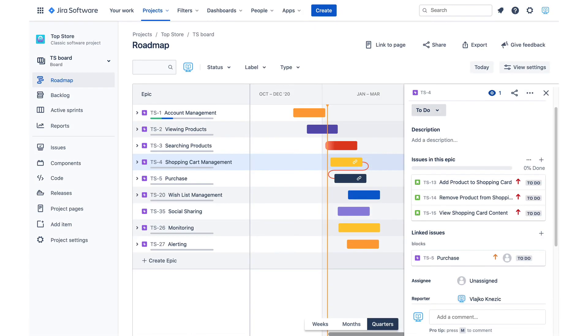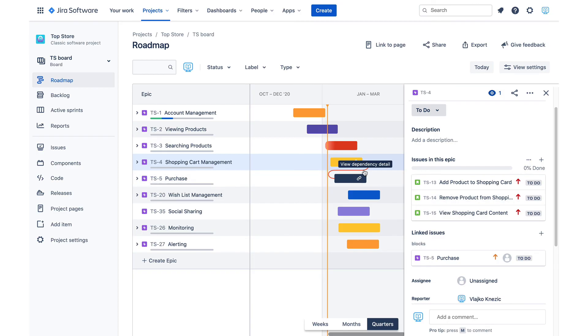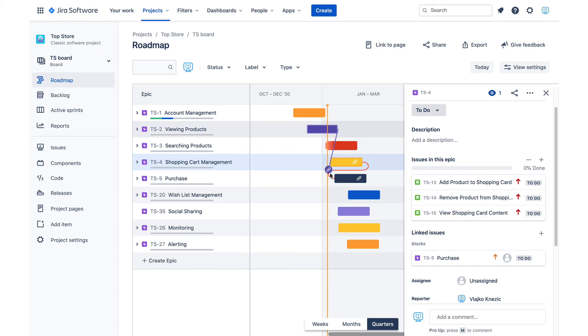Roadmap screen also allows us to see dependencies between epics in a much better visual way than before. For example, I have a blocking link between the shopping cart management and purchase, which is indicated with this line here. If I need to create another one, I can just grab this little handle that shows up when I hover over and drag it to the link topic.